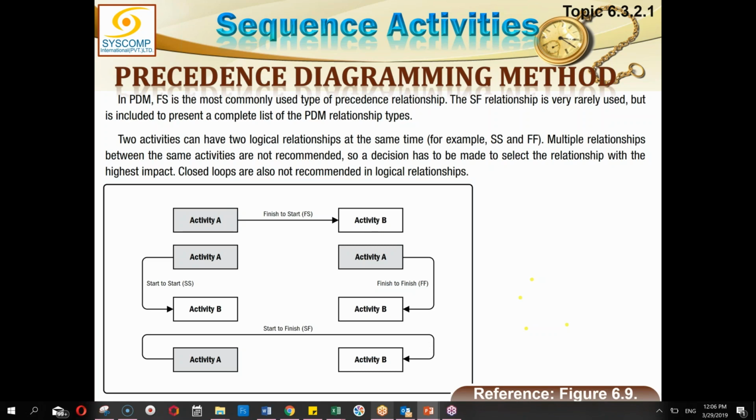You can play around with some of the relationships, and better do it when not in the first attempt. When you are designing the project for the first time, do not try to do everything in parallel. Do not try start to start or finish relationships very often. But during the project, this is the point when you can start thinking about changing some relationships and thus reducing time.